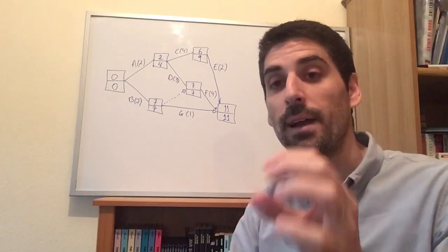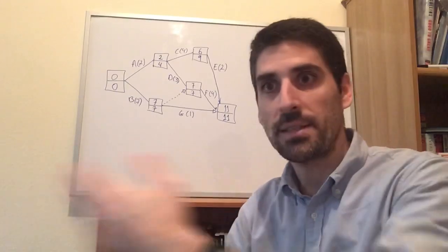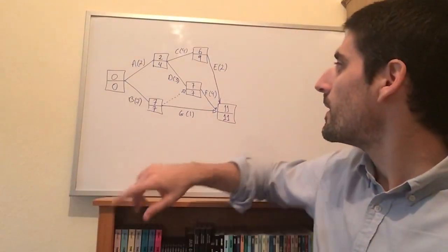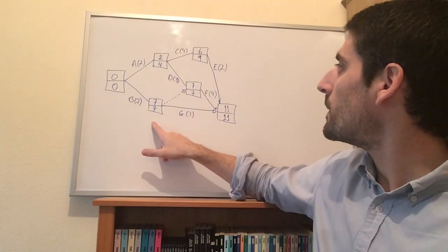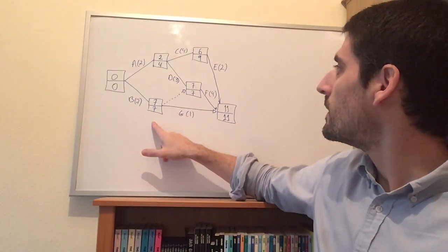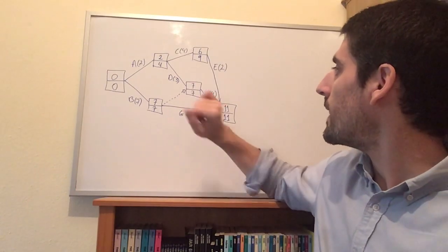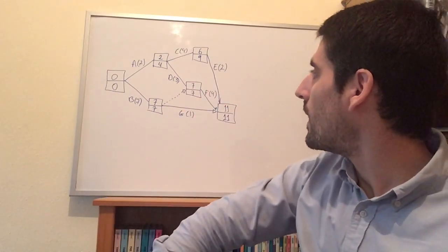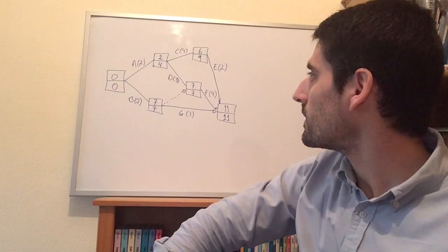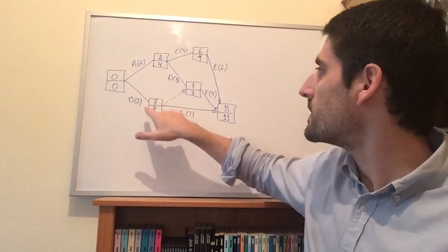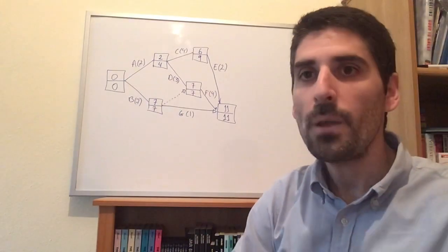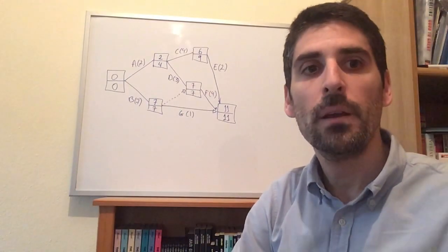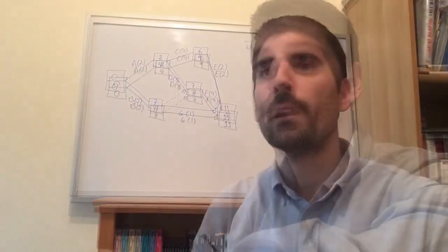They are the activities that if I delay, the whole project gets delayed. So we can see here that B and F are the critical activities. B and F are my critical activities. If I delay them, the whole project will get delayed.